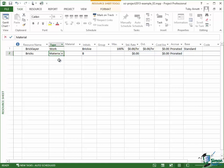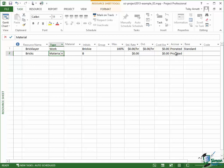You notice that what the default values are changes. The standard rate is no longer per hour. The standard rate is the cost. There's no overtime rate. There is a cost per use. Accrue. I'll talk about accruals later.